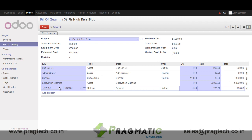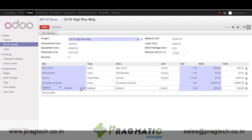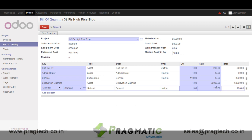Next comes the most important part of a construction project: the direct material used. For example, I have cement. The moment I select cement, its latest market price is populated automatically. We have the option of doing a bid analysis and putting in the best price, so the latest price gets populated onto the project cost head.